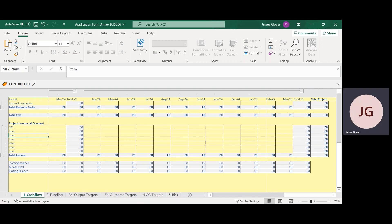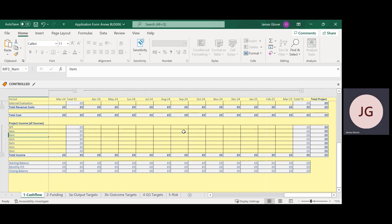Tab 1, Cash Flow. Complete this tab with the project specific cash flow. We do not need to see a business cash flow. Please note that if successful, project delivery must have physically completed and the final claim submitted by the 31st of March 2025.